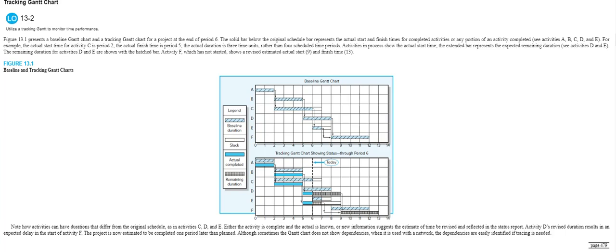And then finally, without a baseline, there is no basis for reporting progress. Progress to plan is how ongoing project achievement metrics are reported. If the plan is not clear and if it's not set in stone, there's nothing to report against. For example, if changes sneak into the project and therefore scope increases and therefore the schedule is delayed or the budget increases, you could say, well, we didn't agree to do that originally.